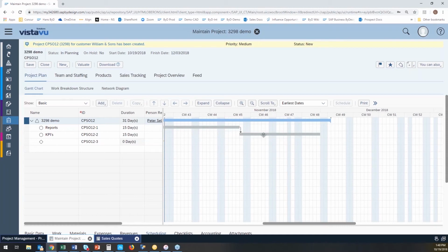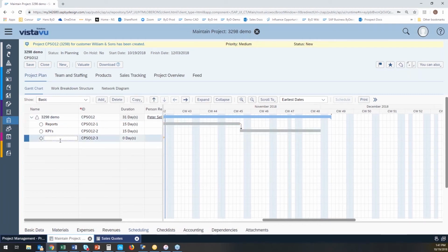If I move that out, this is also telling me that my Gantt chart will change colors depending on if I'm coming up on critical timing. So we were kind of ending our tasks exactly at the same time, or maybe a little bit over where we anticipated our overall project plan to end. We'll see that reflected in real time as I'm moving my days and things around. So if I extend this guy out, it'll make the project red. All right, we'll say end there.